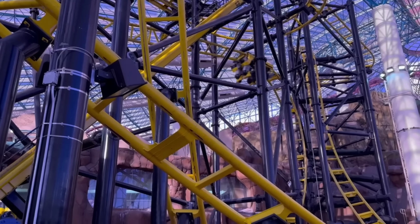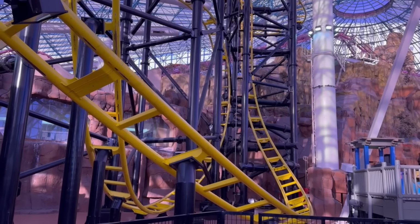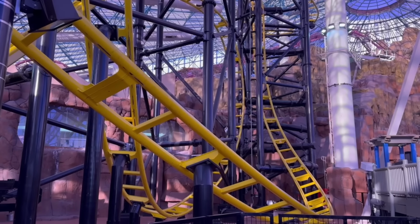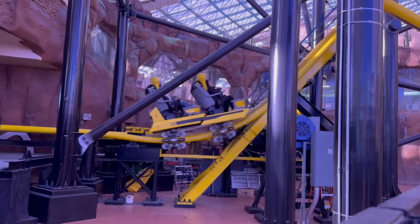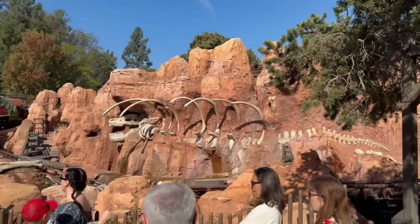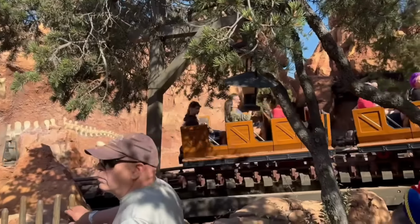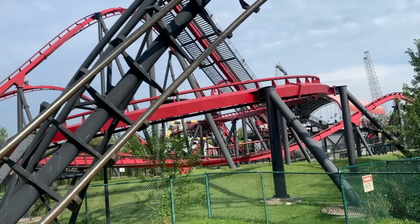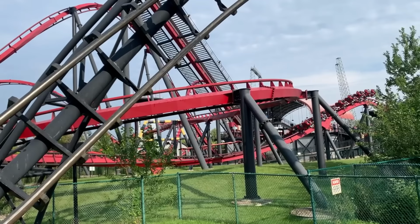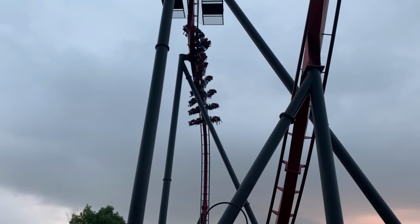Typically, when you start running the train, the speed is very, very low. The speed's really low. The time is really high. And then as the train runs and it breaks in, the two will start to come towards each other. The speed will start coming up, which means your lap times are coming down. And what you're looking for is those two to start to level out. And once those two times are leveled out and that train is running consistent lap times, lap after lap, that's when you start taking water dummies off of it. Okay, and you watch the speed, because every time you take a set of water dummies off, the train gets a little bit slower. You don't want to do shock and awe. You don't want to take all the water dummies off and send it because there's a good chance it will valley. But you're still breaking it in. So you want to do that. It's like, okay, take some off, take some off, take some off.